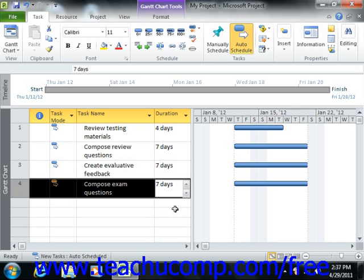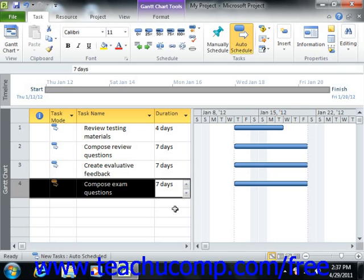So using the previous example, you could enter an elapsed task duration for the 'wait for paint to dry' task by typing 2EH into the duration field for that task. That would set an elapsed time of 2 hours that do not need to be performed during scheduled work hours for the selected task.